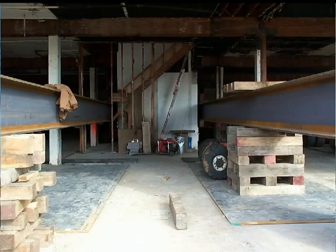7. An elevator shaft in the center of the building required the design to position the support structure and the dollies around the shaft to redistribute the weight to accommodate the shaft. 8. The structure would have to be moved up a 3% grade to reach its final destination. 9. The move would not be a straight line, but rather the building would have to be steered during the move to achieve the correct position on the new foundation.